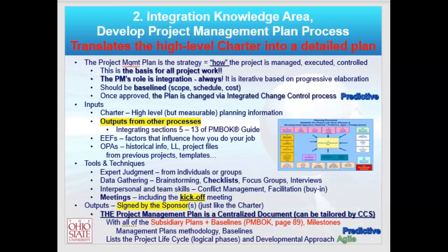Now, from a technology, tools and techniques, it's the same tools and techniques, but notice in data gathering, they just added checklists. And, of course, meetings would be important. Think about it. It's Develop Project Management Plan. That's the name of the process. So, I want to have a kickoff meeting when the plan is ready. It's one of the tools I'll use. It's a way of getting the good news out and demonstrating who's in charge, right? And so my one big output is the project management plan.